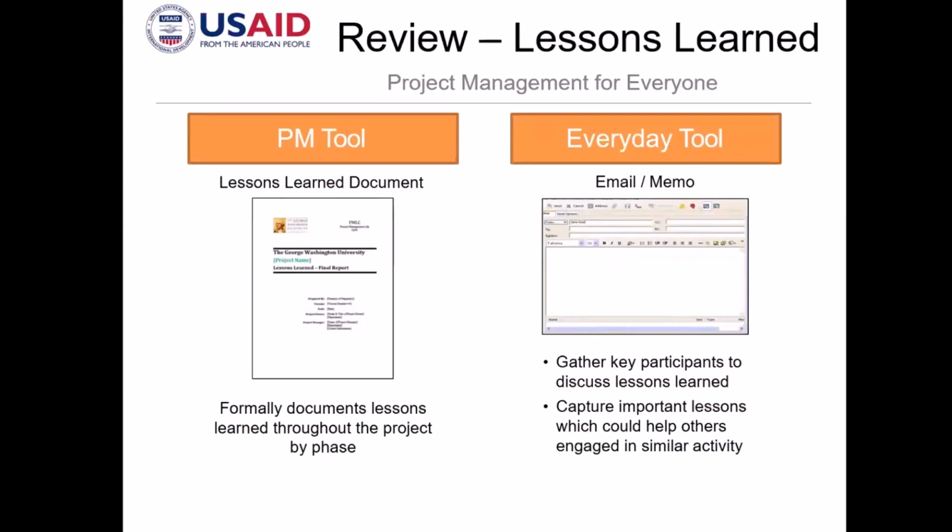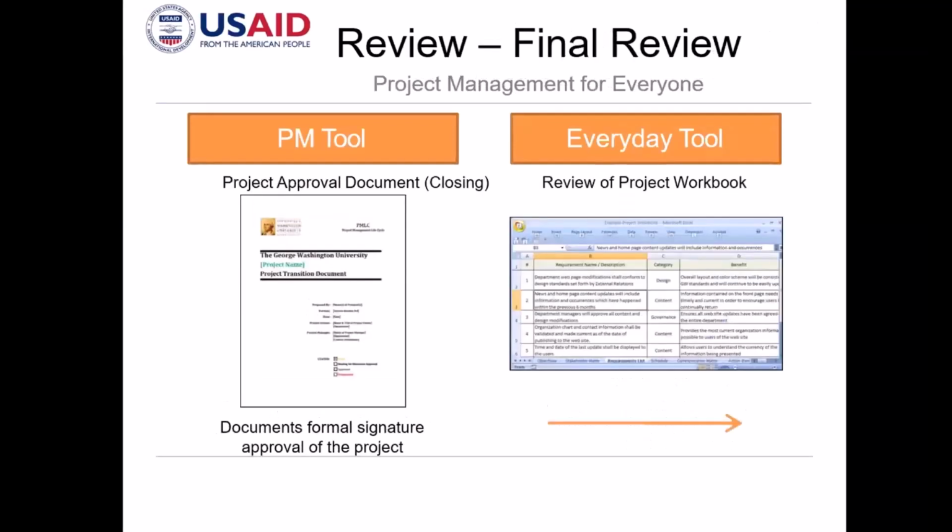And this is also published to my stakeholders so that this will be an important document that will be captured and put into the repository, something that PMs who will be doing other projects in the future can look at, so that they will have a better understanding, if it's a similar project, of what went wrong and what went right during the course of a specific program. And then once you are done with the final review, we have to close the project, right?